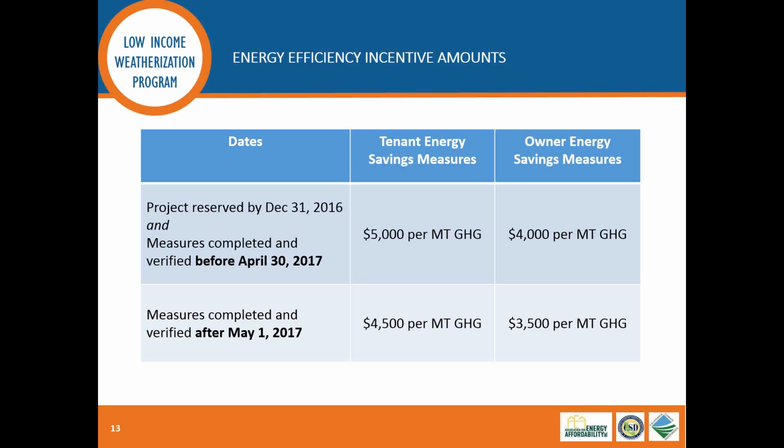Yeah, if that is a requirement in order to install the energy efficiency measure, if asbestos or lead or whatever other hazardous materials could be involved, then that needs to be fully covered by the owner. The incentive that we're providing, again, is based on the energy savings, so if there is any abatement issue, there's no additional grant funding to cover that. Ultimately those costs would be the responsibility of the building owner.